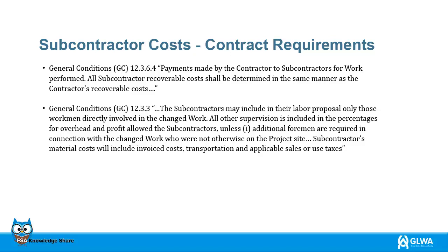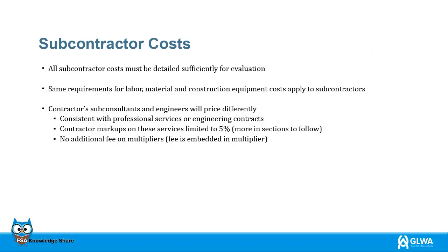Subcontractors' material costs will include invoiced costs, transportation and applicable sales or use taxes. All subcontractor costs must be written out in detail for review. The subcontractors are bound to the same requirements for labor, materials and construction equipment costs that our contractors are.